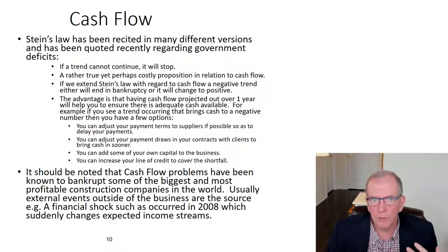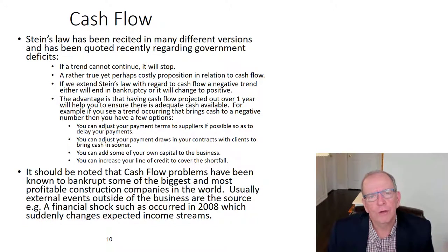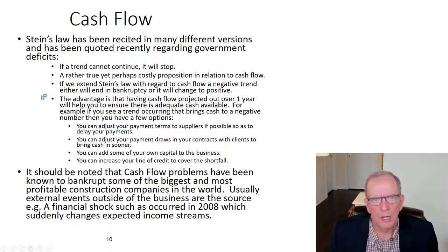If you do a lot of government work in construction, you deal with companies and bureaucracies, and sometimes it takes a long time to get paid. So you have to have a good understanding of how long it's going to take, and you have to make sure that you follow up on these things. And accounts payable, you have to pay your trades. Now, you can try to negotiate longer terms, and I'll talk a little bit about that when we come to an upcoming case on cash flow that I want to go through with you on a strip mall. It's kind of just how it was constructed and some of the things that you need to think about, to get you thinking along those lines.